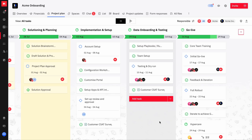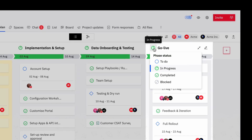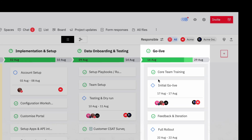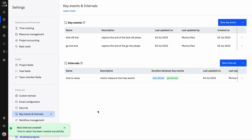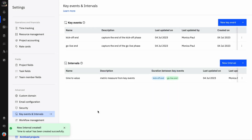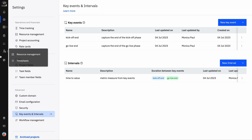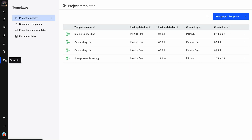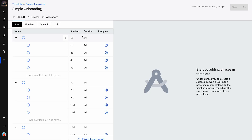Next, let's automate the recording of these key events. Key events can be automatically captured by recording the dates at which your team members change the status of a task or phase. You can establish specific conditions for these status changes at the template level, ensuring that all projects using the template follow these conditions for capturing key events. Navigate to Templates and select a template for which you wish to record key events.